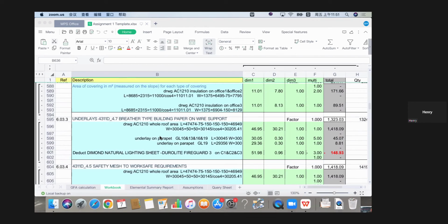But for other elements, I get the rates in Rawlinson for 2014. So you have to use the indices, right? The prices are not in the same year. I think you should check. Rawlinson should have all these prices.